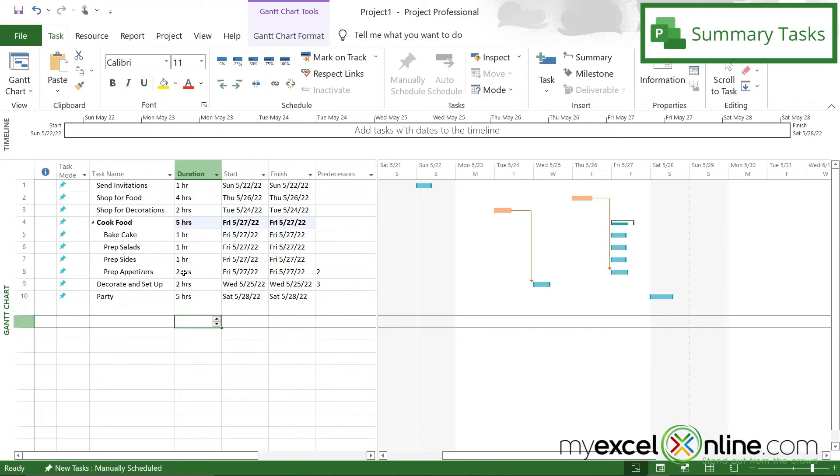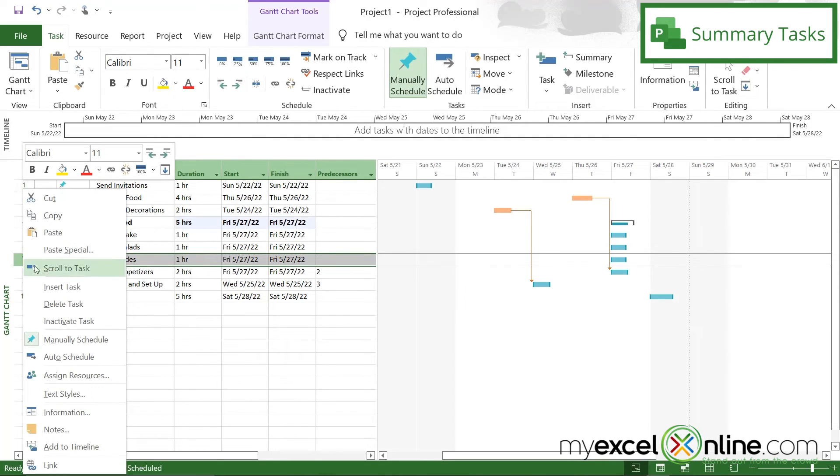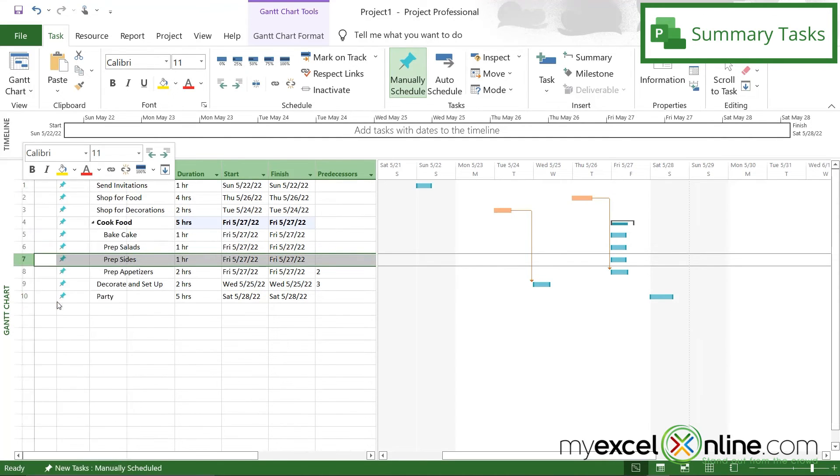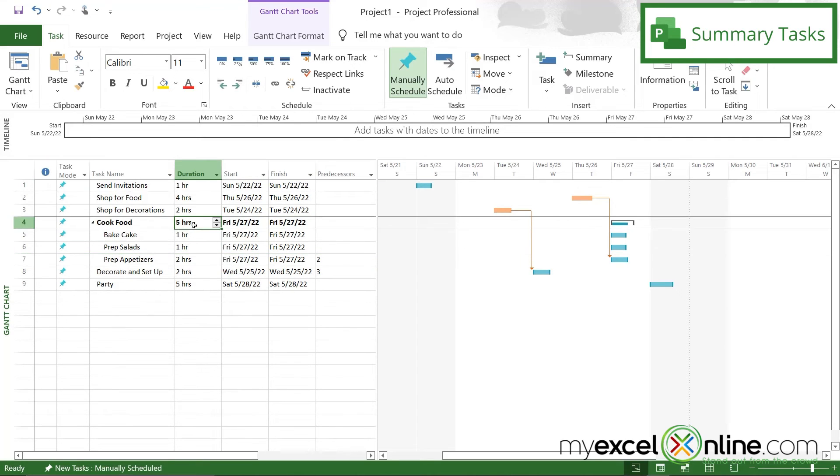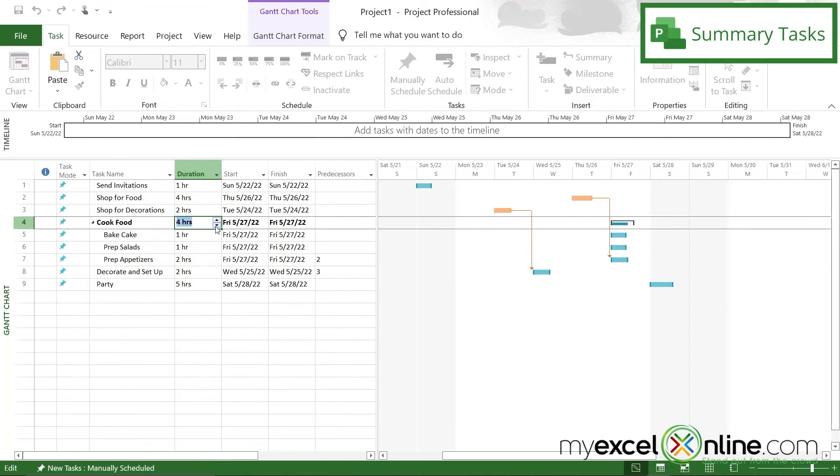Now if I had a task on here that I no longer needed to do, I could highlight the row and right click and go to delete task. But I would have to go back here and update this manually to four hours.